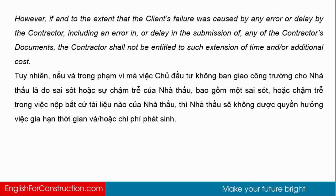However, to the extent that the client's failure was caused by any error or delay by the contractor, including an error in or delay in the submission of any of the contractor's documents, the contractor shall not be entitled to such extension of time and/or additional cost.